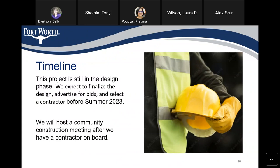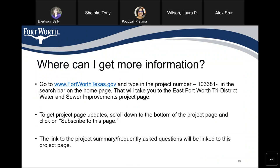Now we'll talk about the timeline of this project. This project is still in the design phase. We expect to finalize the design, advertise for bids, and select a contractor before summer of 2023. We'll host another community meeting after we have a contractor on board. For more information, visit www.fortworthtexas.gov and type project number 103381 in the search bar. You can scroll down to the bottom of the web page and click 'Subscribe to this page' for updates. The project summary and frequently asked questions will also be linked to that project page.